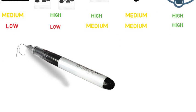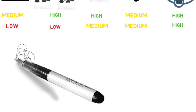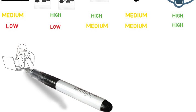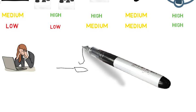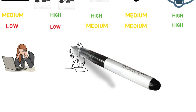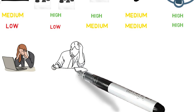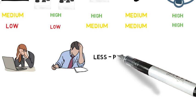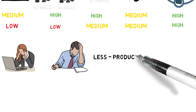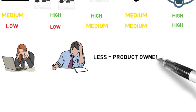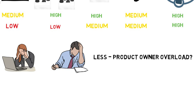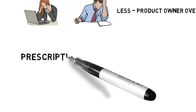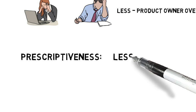Now, let's take a look at another aspect, which is a note. As I look at LeSS, something that we see is that there is a potential for what I call product owner overload. Product owners are coordinating with teams, many teams, stakeholders, upper management, scrum masters, and there's a lot of work. Now, what SAFe generally does has product management and business owners and other roles, release train engineer. The product owner really has a lot of work to do, and it seems like it's potential to lead to some overload. Okay, let's go on now and let's take a look at some additional points.